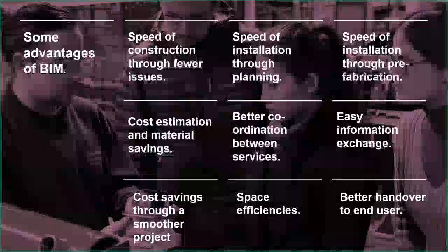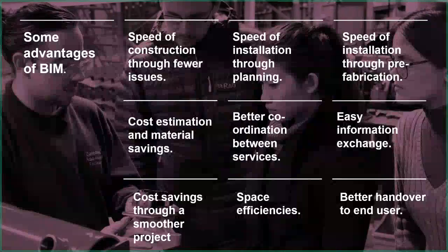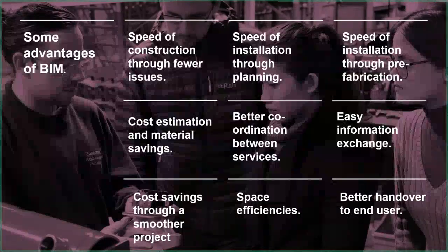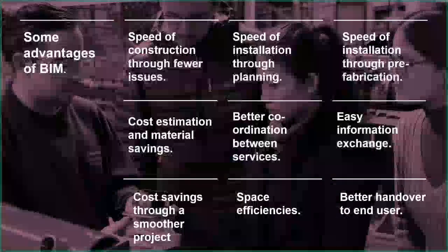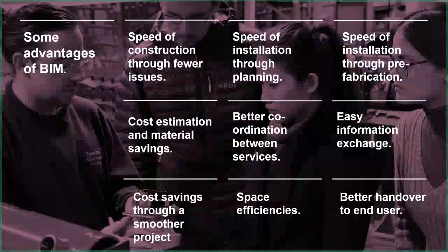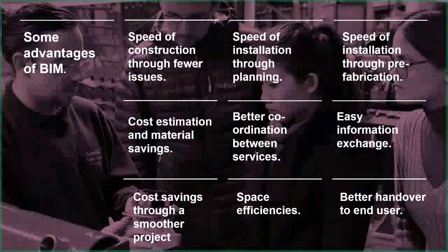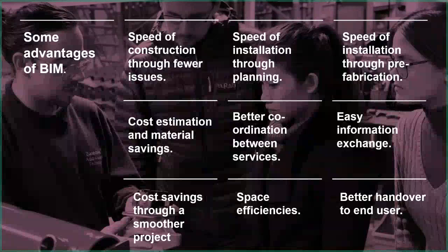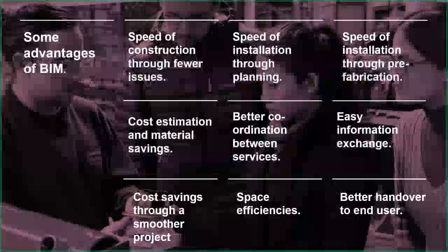Prefabrication is made easier because we have this kind of 3D environment to work in. We know what space we're going to be working with. One of the problems of prefabrication is being able to be confident that we can actually fit it into the building, because often these prefabricated units are big, just by their nature. So again, BIM allows us to plan ahead and think, okay, do we have access? What's the journey that this component is going to take through our building into its final location, so we can again be more confident that it is going to work.